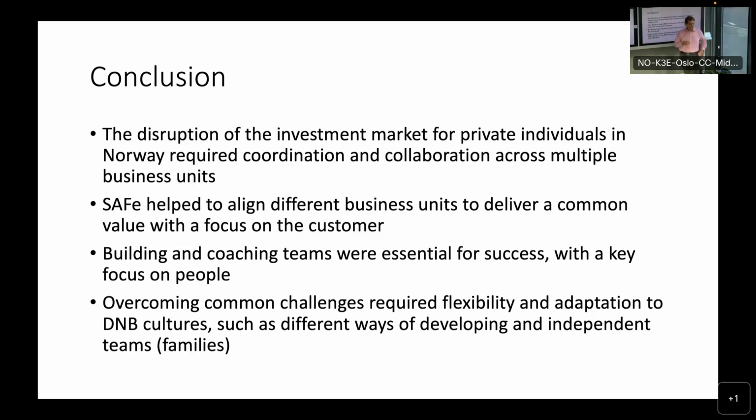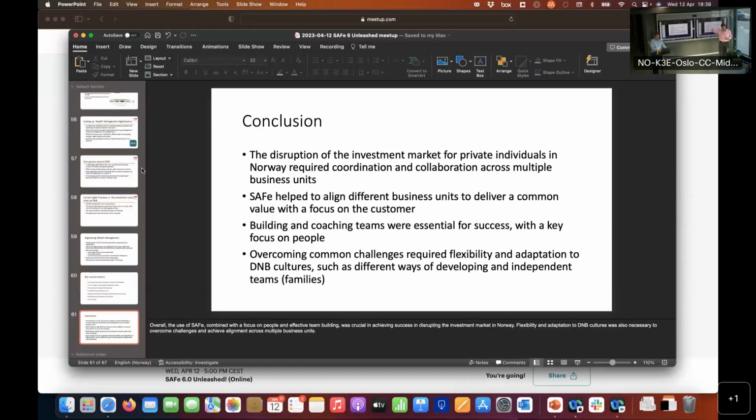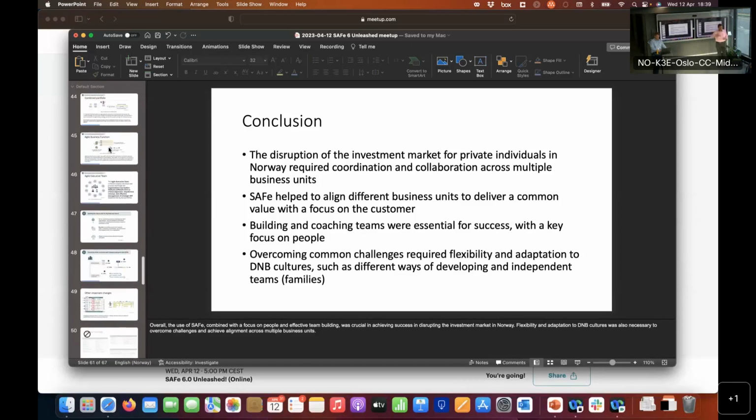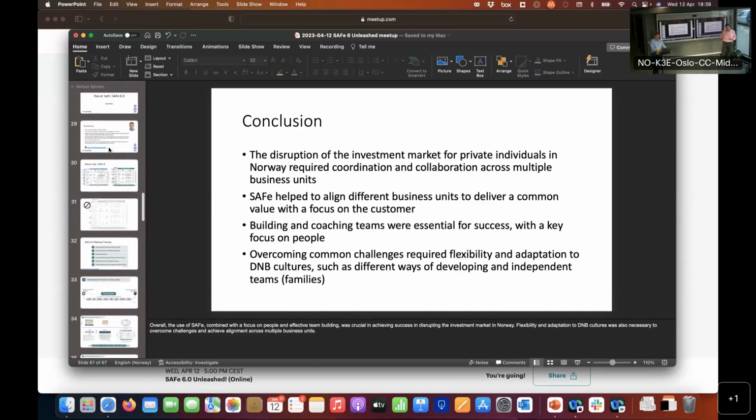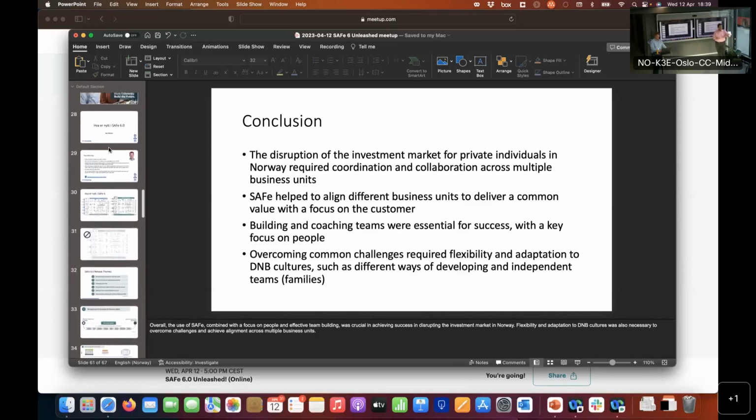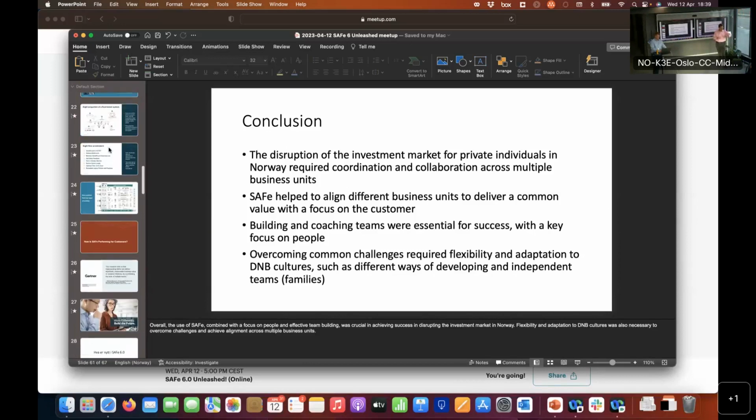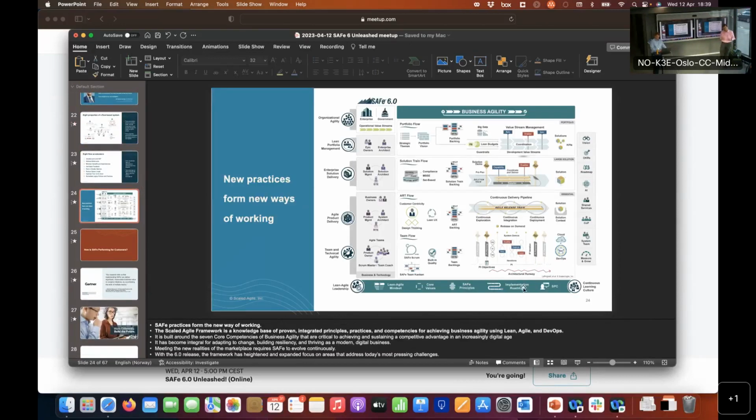What I created was, in SAFe, when you have continuous exploration, continuous integration, continuous deployment, and release on demand, when you see the 4, they say the 4 happen at the same time. It's not something you do in sequence. What they say at the end, you have education, you have some training. So you use the IP, the last iteration, to do it. But you don't only do it then.